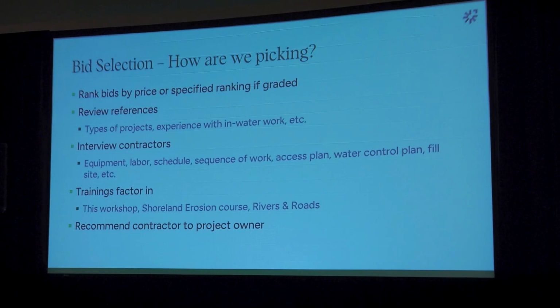Meaning, do they have the right labor? Do they have the right equipment? Are they close enough, in proximity, to be able to respond if something comes up? There have been cases where we have not recommended going with the low bidder because something just doesn't feel like a good fit for the project itself. So that's really what we're doing as part of this evaluation process.